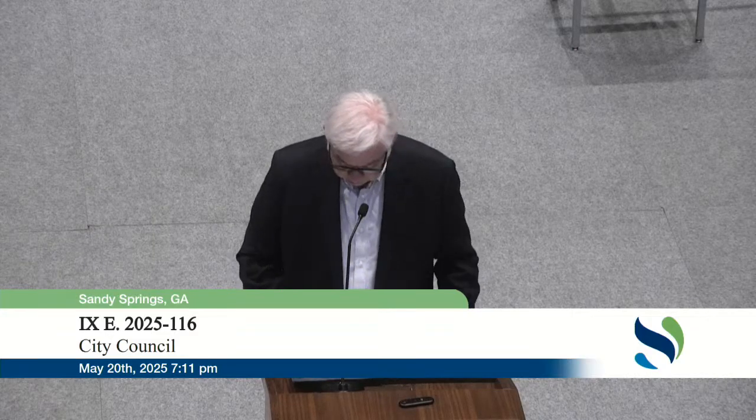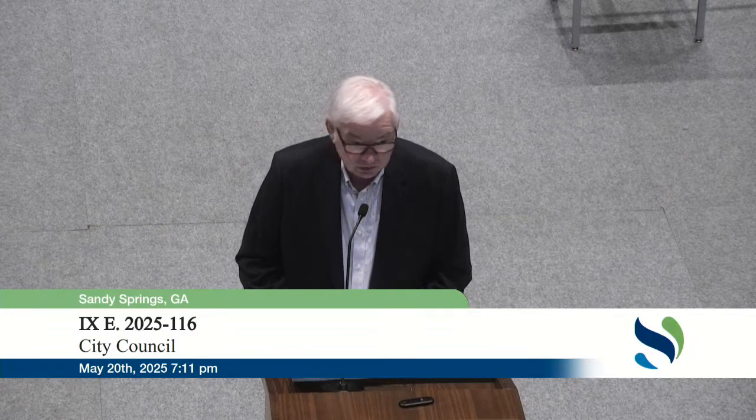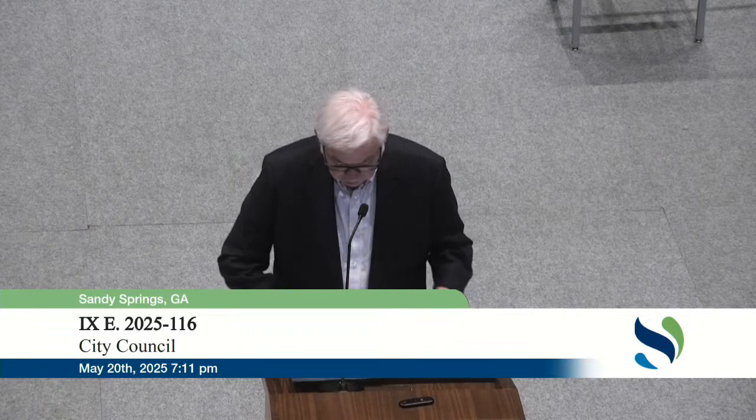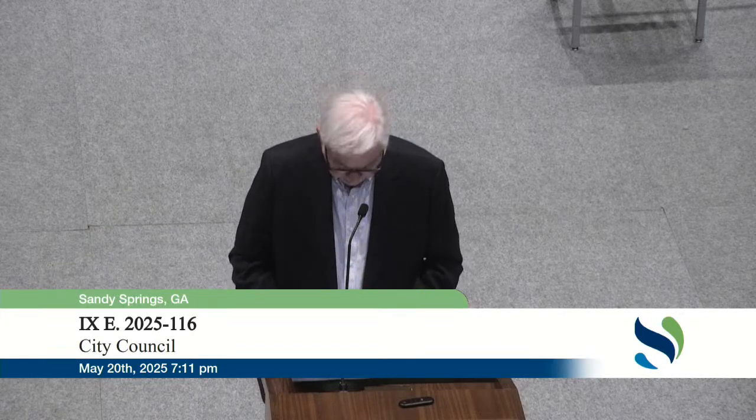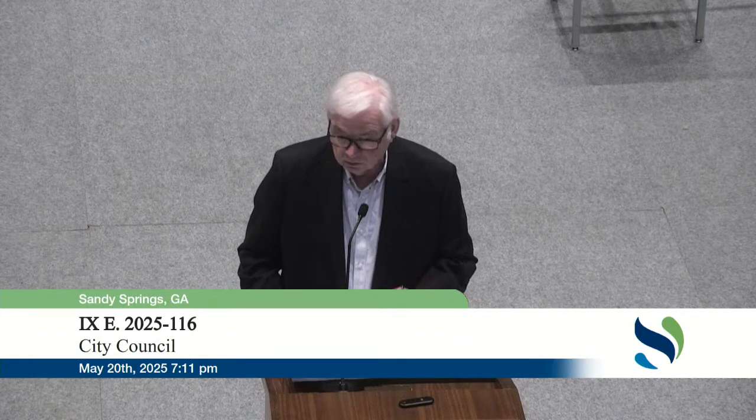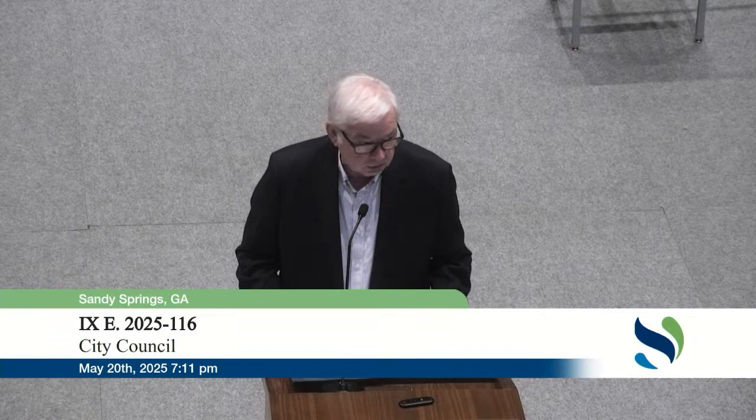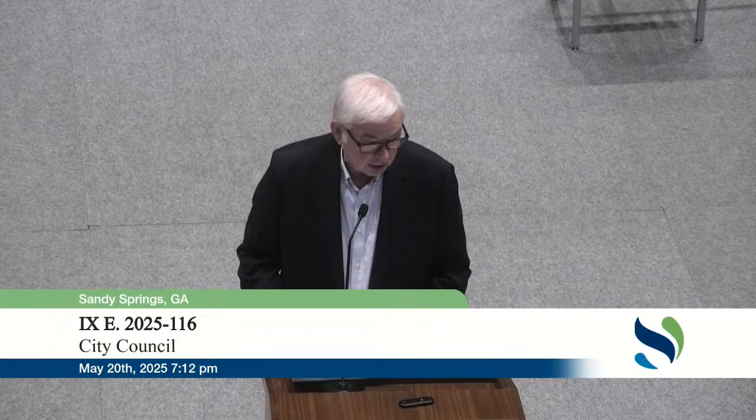Staff prepared the attached list of streets representing an additional, and to the prior program presented to you, 4.15 miles of roads that are in need of repaving and currently projected for resurfacing in the fiscal year 2026 program. The list was compiled using the 2023 PCI assessment that we discussed just a moment ago. The proposed street list is attached to the package, as well as the other documents, very similar in nature to the original LMIG application documents we presented earlier this year in January.